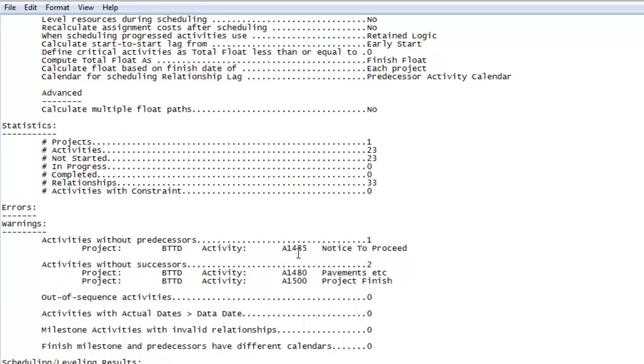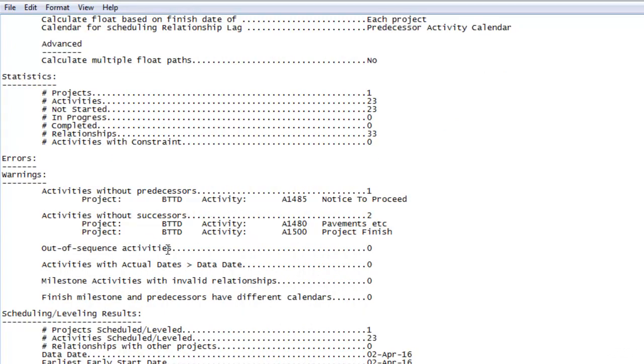It also tells us if our project has any out of sequence activities, or there are any activities where actual dates are greater than data dates. So you get a whole lot of information from schedule log. It will help you to understand the health of the schedule as well, whether the schedule is correct or not.